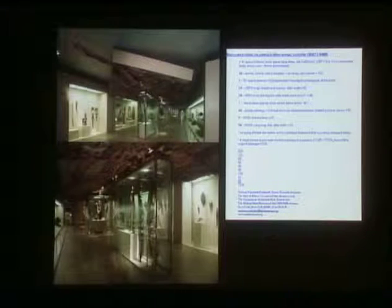Once the planning phase had ended, the next phase, wing deinstallation, began. Step one was to empty out the gallery space under the mezzanine so that the storeroom could be built. And as you can see, this gallery in these two pictures, and as Eric has shown you, is filled with art and with heavy casework. And this casework and all of this are I-beamed into the slab above it. It's really built for the ages.